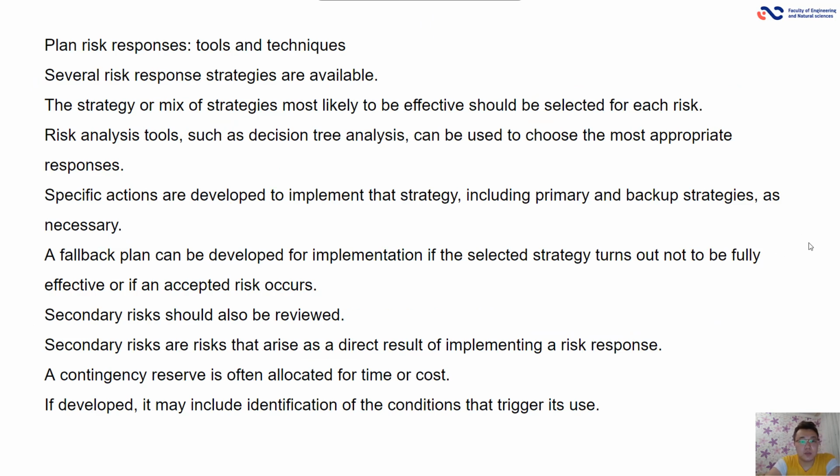Plan risk response tools and techniques. Several risk response strategies are available. The strategy or mix of strategies most likely to be effective should be selected for each risk. Risk analysis tools such as decision tree analysis can be used to choose the most appropriate response.